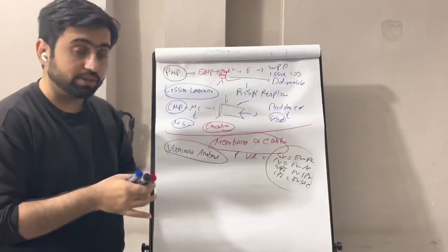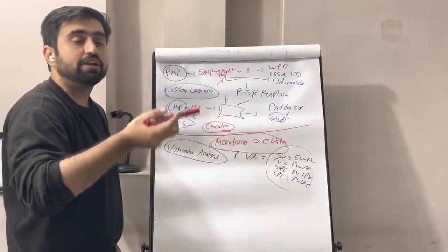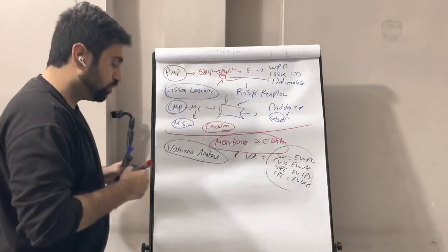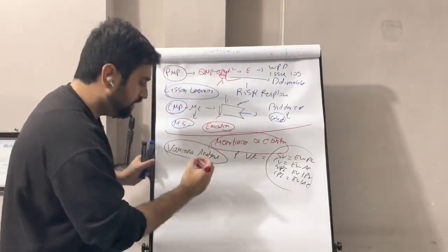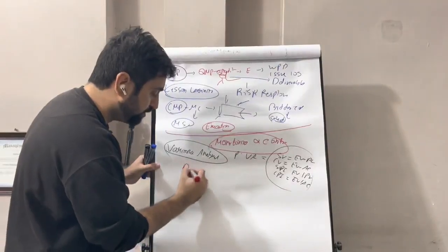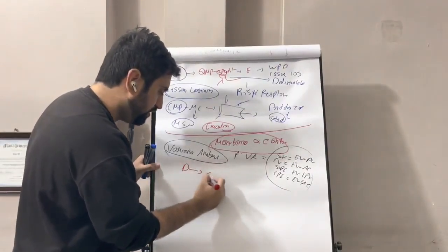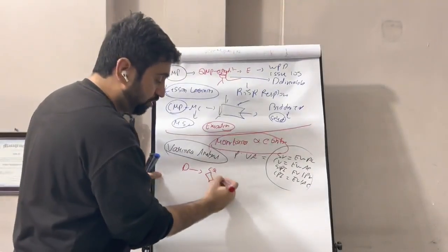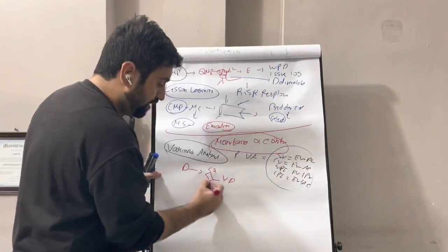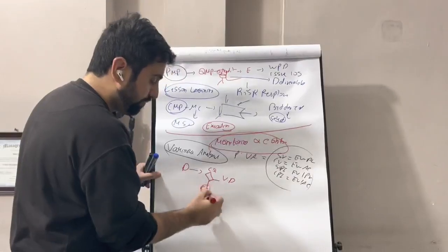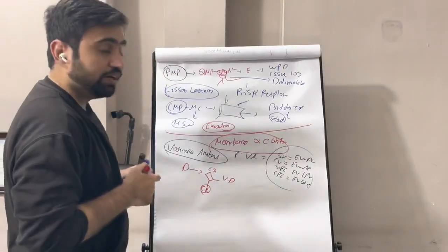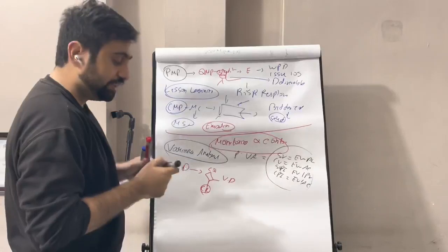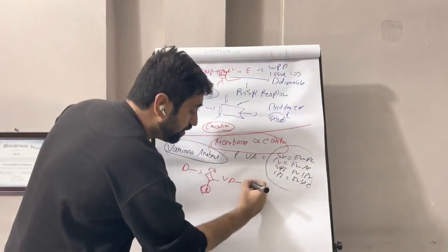And quality is very interesting. The deliverables that were produced go to quality. This is called the journey of deliverables. Deliverables that were produced go to control quality. Control quality checks them. If they accept it, it is called a verified deliverable. If not, it becomes a change request. The verified deliverable goes to validate scope.